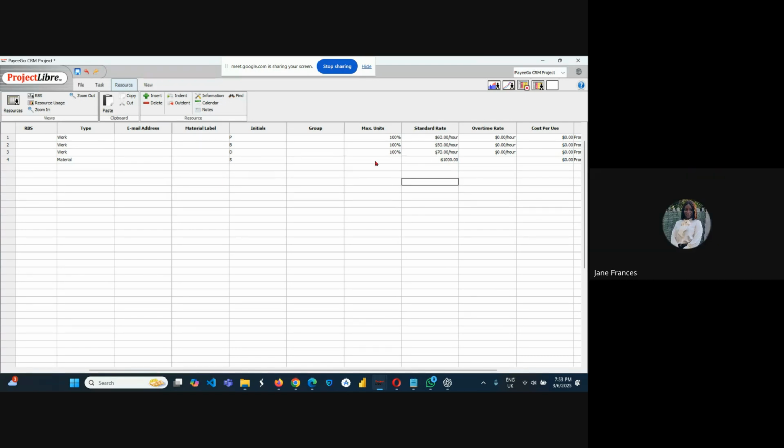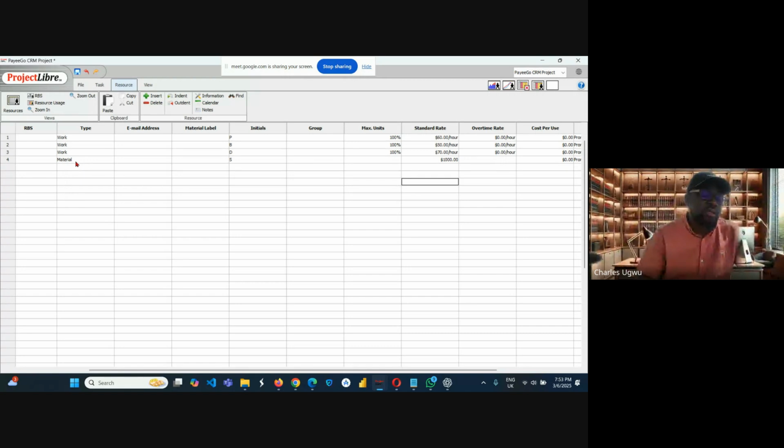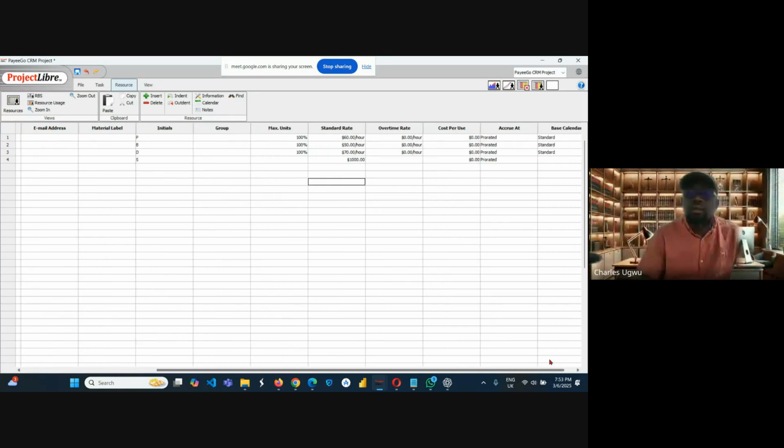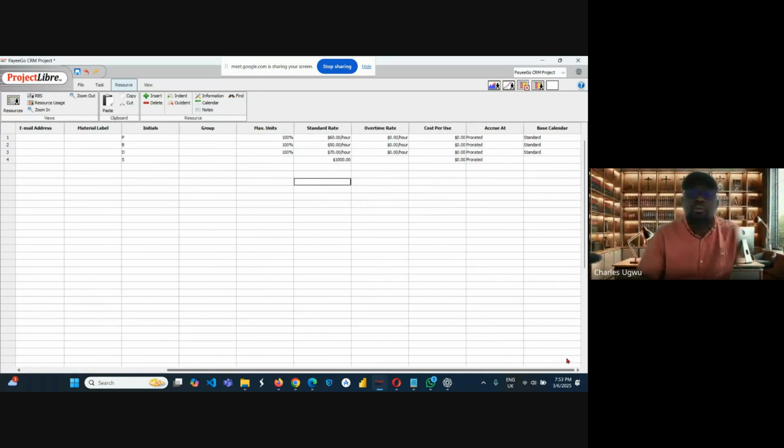Yes, sir. It's because it's material. It's one you buy, but this one is a rate, you pay per hour. So that is what we've done here. We're not working overtime, so we're not going to capture any overtime. We can leave it like this for now.